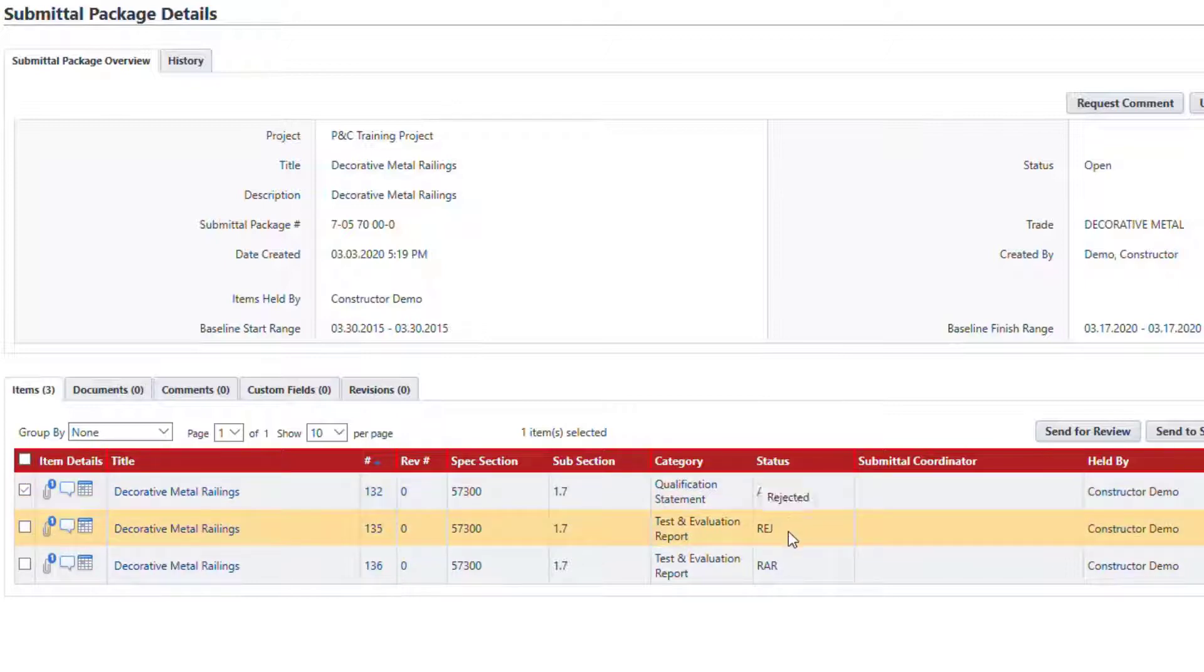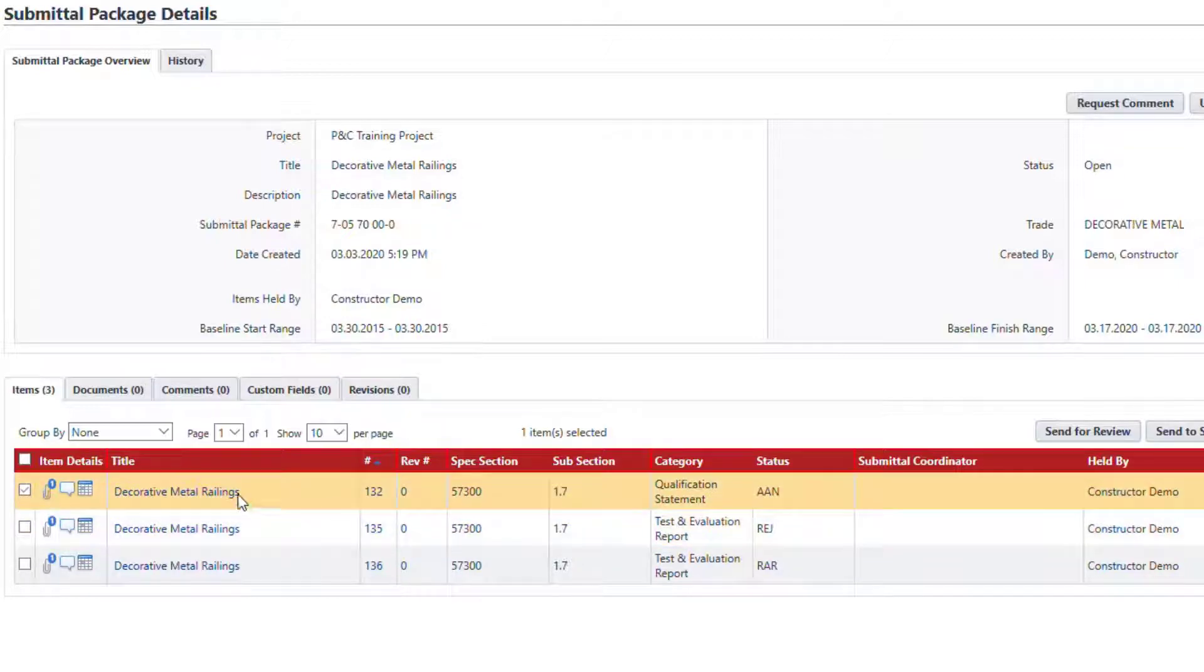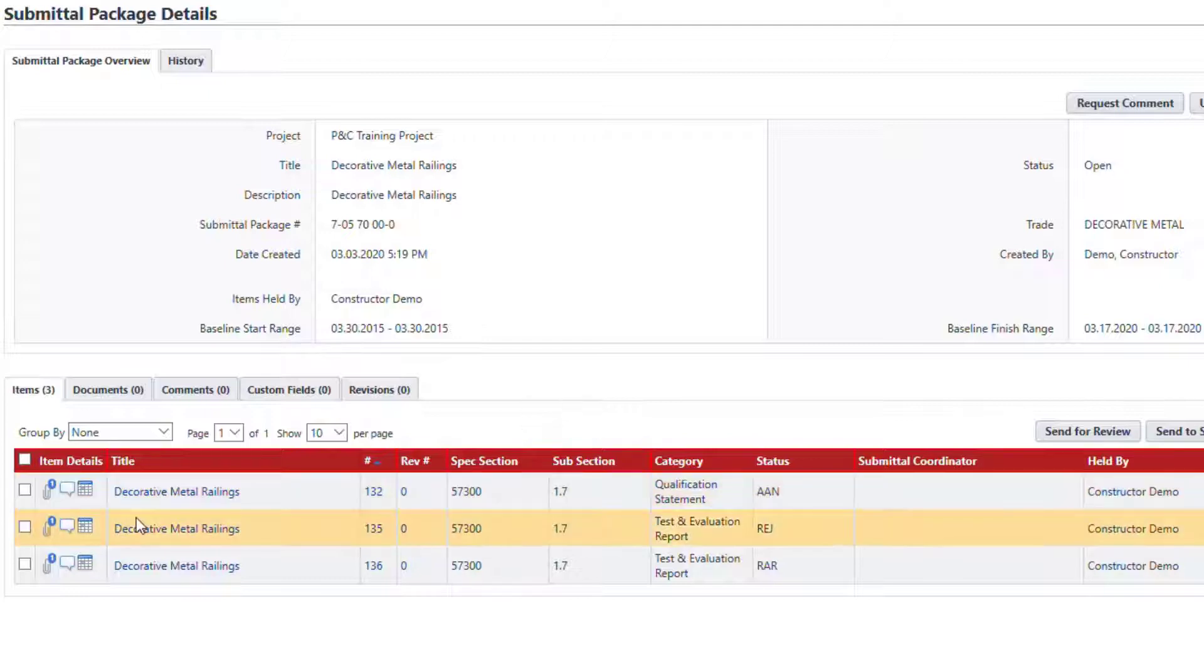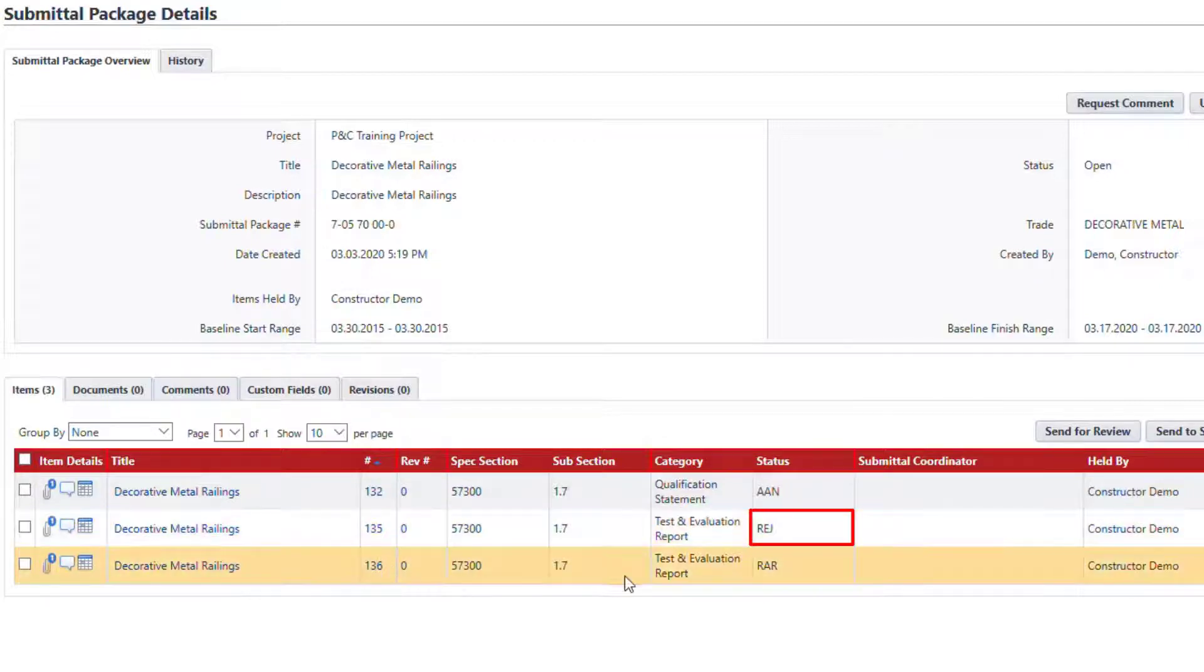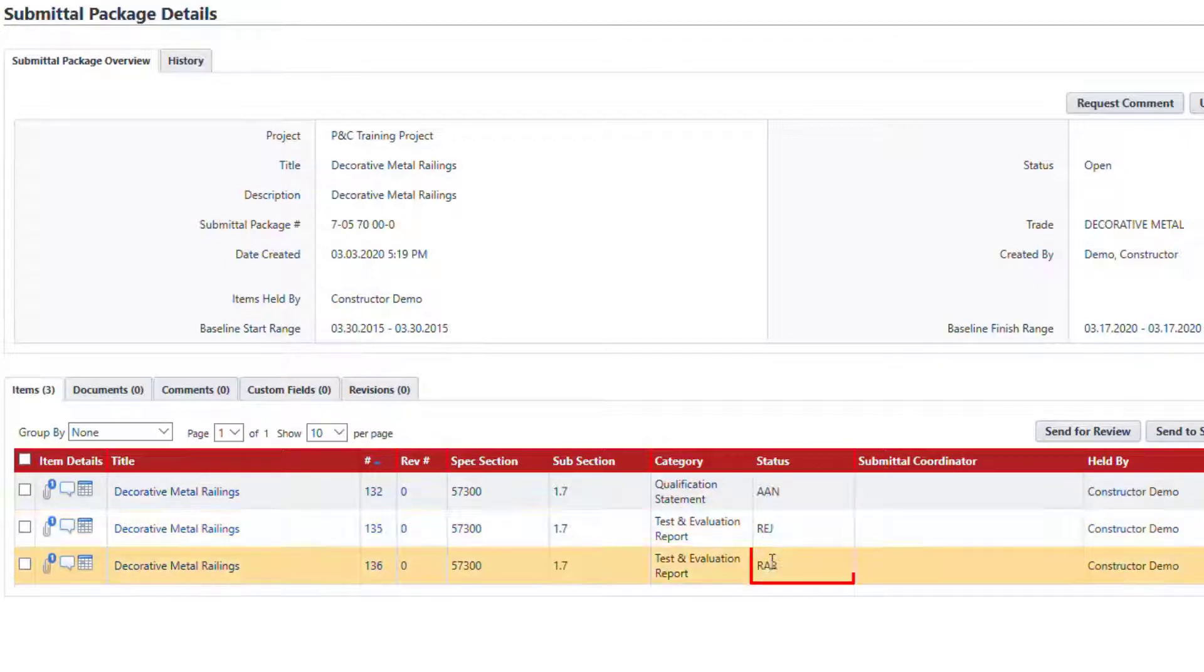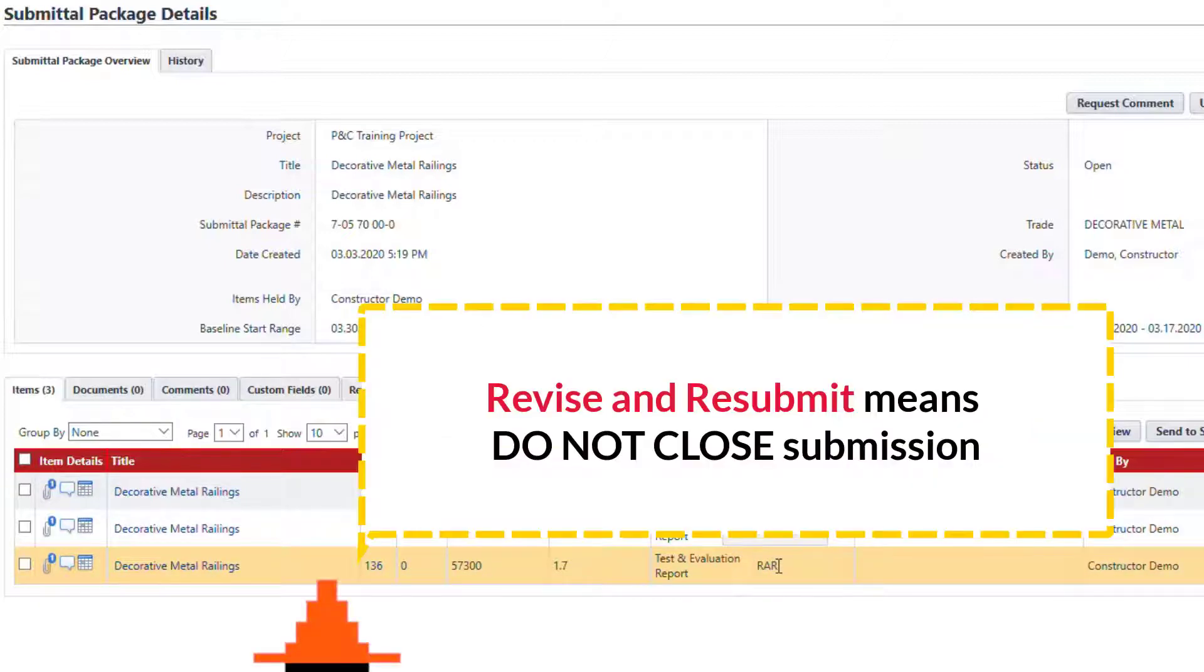During the last six years, I have seen many professionals that interpret the rejected status differently. To avoid confusion, Procore has created two separate statuses: rejected versus revise and resubmit.